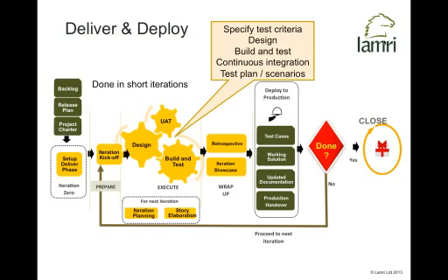which is about identifying our initial backlog or set of requirements. We'll talk a bit about what requirements mean in an Agile project shortly. Then a high-level release plan, and a reasonably high-level project charter: this is what it is, this is the problem we're solving, and this is what we're going to do to solve that problem.